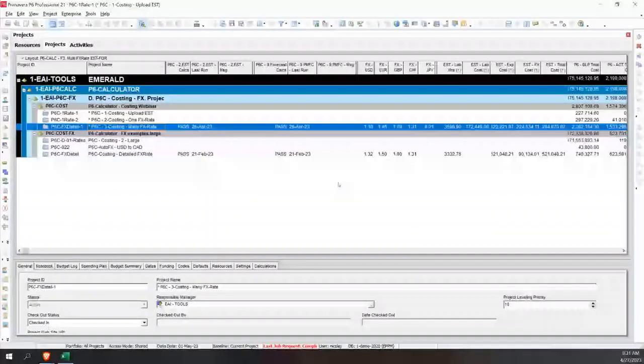So when you have multiple exchange rates in a given project, you need a bit more flagging, if you will, at the project level to help you put in what are the exchange rates that you've agreed with this client for this project, okay? Or what exchange rates have you estimated this project with, okay? So it could be not necessarily that you have to have an agreement with the client for those rates, but it's something that you put into your estimate. Now, when we built this functionality into the system, we had designed it for just 2 rates.